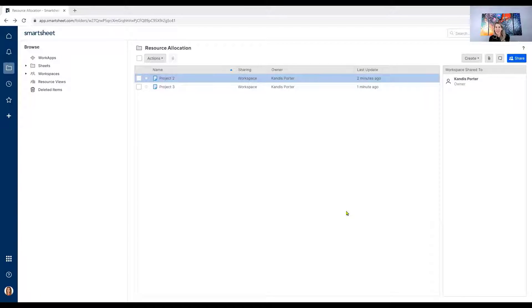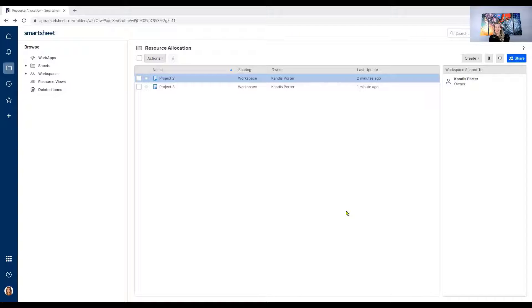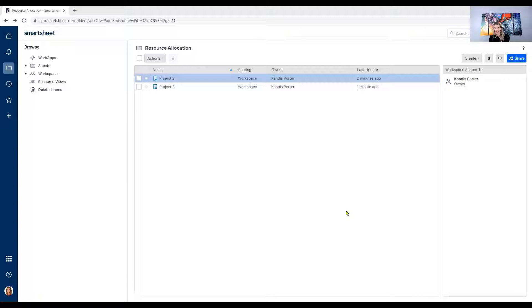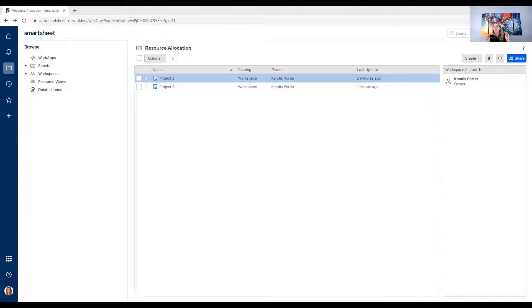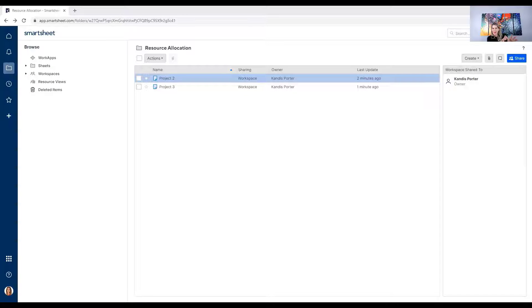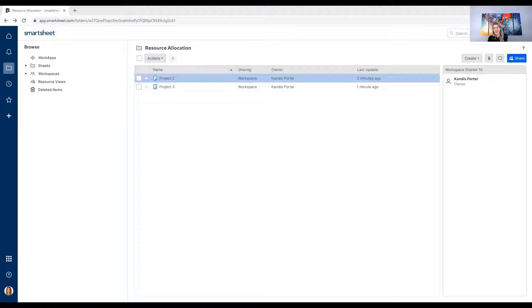What I'm going to show you now is how you go into the projects themselves if you're not using these features yet and get them set up. I am now in Smartsheet and I have a folder where I have a couple of different projects. Now, all of the projects are going to need to be linked to your Smartsheet. So one key thing is that sheet owners and team members on the same account that are shared to the sheet with admin level permissions can turn on resource management. So this will allow the resource viewers to go out there and take a look and make solid decisions about workloads.